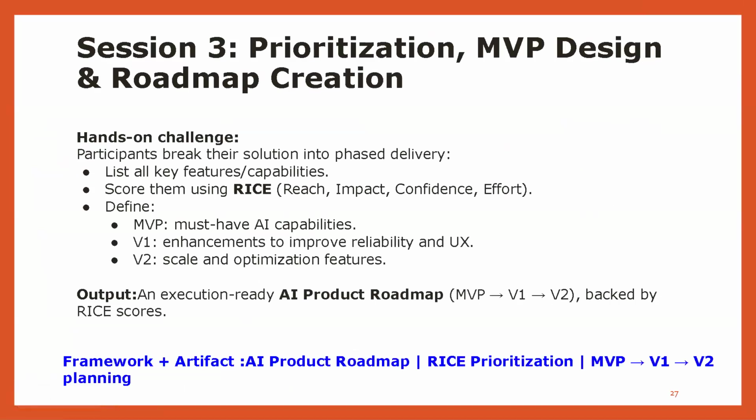Don't you think the risk that we deal with here, we add it in the PRD itself? No, you're not yet at the stage of writing the PRD. If your product roadmap is rejected by the CTO or the CXO, will you write a PRD before the roadmap is approved? No. So first, what is the sequence of steps? We prioritize, we make an MVP roadmap or V1, V2 roadmap, and then we identify the risk and tell the stakeholders and present to the team. Correct? And we show the UI/UX sometimes also if we have those roadmap items. These are the 4 or 5 tasks we will do.